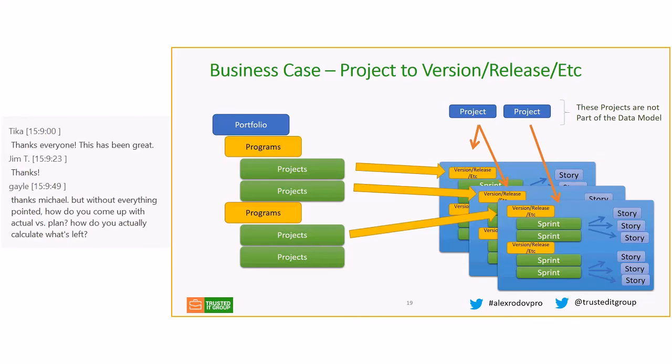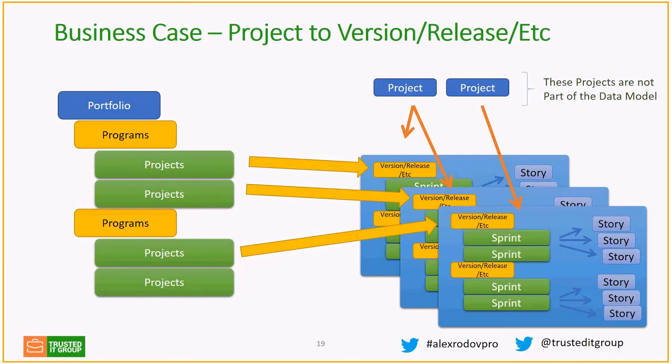So I haven't seen that much incorporated in Agile, but for large projects that I've been involved in, we definitely use some metrics coming from Agile environments that participate in the earned value calculations for the waterfall projects, where part of the waterfall project is an Agile component, which is pure development and testing. So these metrics for development and testing are coming into the waterfall project and participate in the earned value metric.